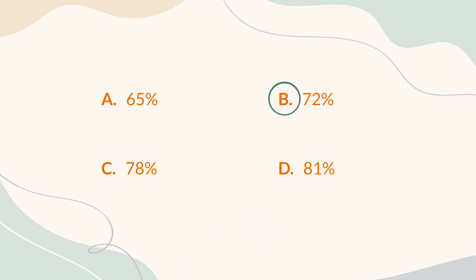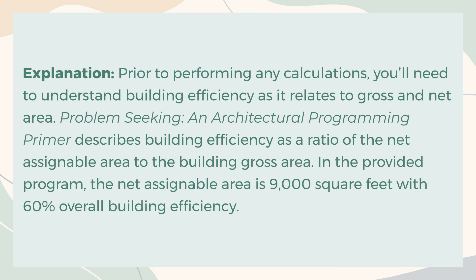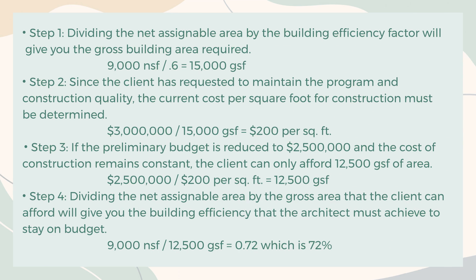The correct answer is B. 72%. Explanation: Prior to performing any calculations, you'll need to understand building efficiency as it relates to gross and net area. Problem Seeking, an architectural programming primer, describes building efficiency as a ratio of the net assignable area to the building gross area. In the provided program, the net assignable area is 9,000 square feet with 60% overall building efficiency. Step 1: Dividing the net assignable area by the building efficiency factor gives the gross building area required. 9,000 net square feet divided by 0.6 equals 15,000 gross square feet. Step 2: Since the client has requested to maintain the program and construction quality, the current cost per square foot must be determined. $3,000,000 divided by 15,000 gross square feet equals $200 per square foot.